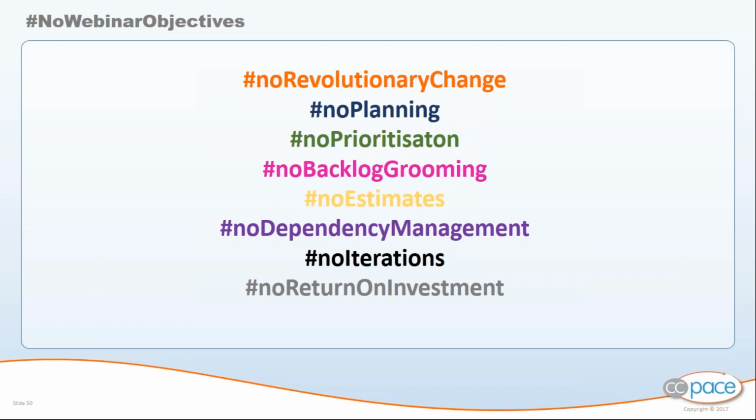and taking all the work that you've done, because you've got data, and leveraging it and saying, a change request for marketing takes on average 18 days or 3 days, 95% of the time. And when your client asks you, how long is it going to take for this change request in marketing to be done? Well, instead of saying 5 days, 4 days, and always missing the target, you tell them, based on our history with you, empirical evidence that we have with you, the client, well, we can do those in 5 days, 95% of the time.